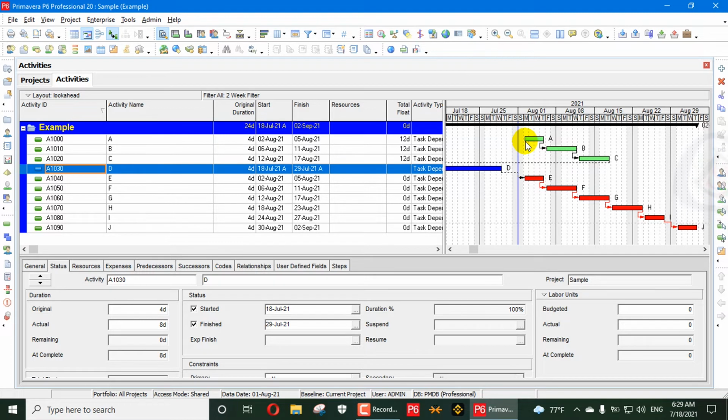D is now following its own relationship with E. E continues after finishing D. So if D is done, E will continue. It will ignore C, B, A. It will ignore all the previous relationships. It will just progress override and continue its work.